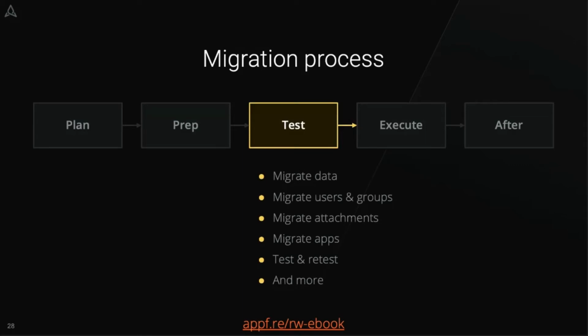Next, it's time to conduct a test migration. So we don't want to just move everything to the cloud production site right away. We want to make sure we test in a sandbox environment. That'll help us understand how much time the migration takes, how much downtime to expect, whether there are any data collisions or complexities to address, and whether all data transferred as desired. So be prepared to test the migration more than once and don't migrate to production until everything's perfect.